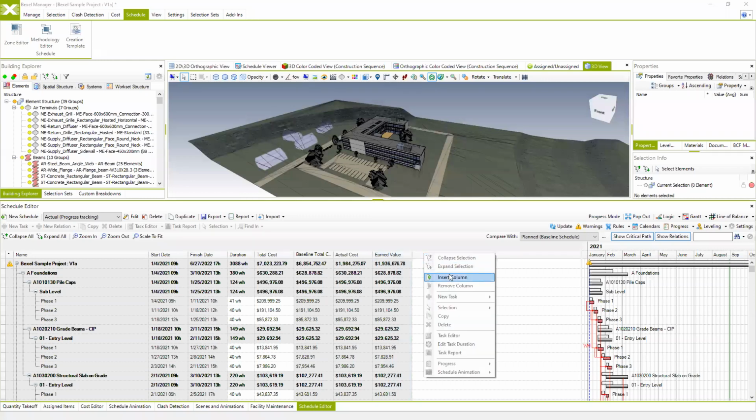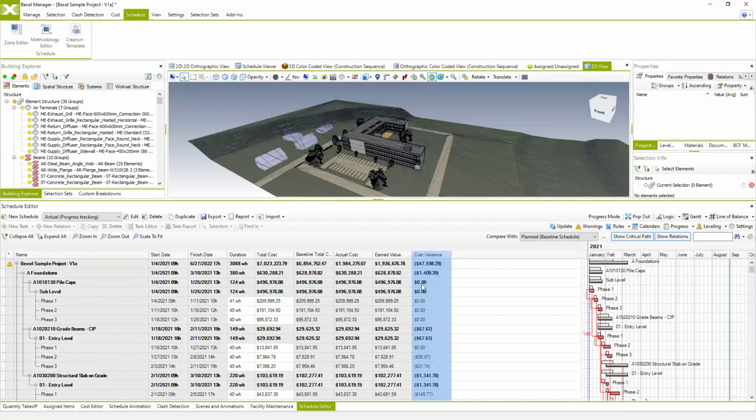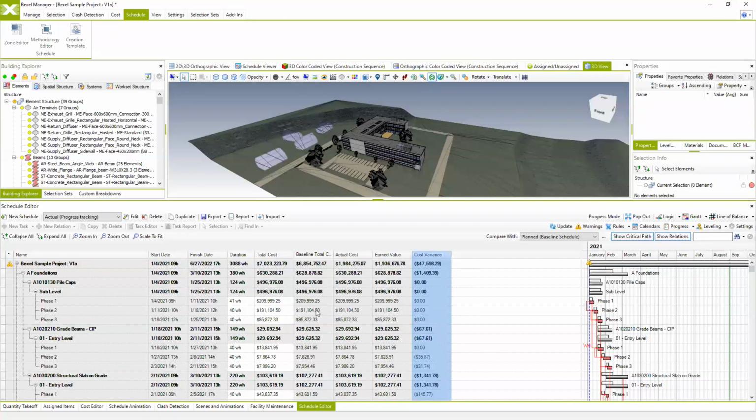And let me just include an additional column, which is also available. It's cost variance. So here we can check where we are. Do we have some benefits for each task or not? Which are our expenses or the benefits from the executed works in this period of time? And of course, I can include an additional column which is related to the percentage.